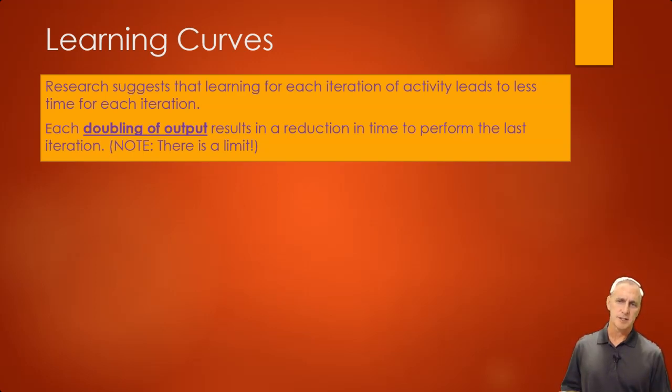And so it costs us less in time, thus less in money. Note, there's always a limit. You're never going to decrease your time down to zero because there's always at least a minimum. So we usually have something that plateaus at a low range where you just can't really do it much faster unless there's a massive method change.